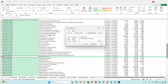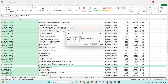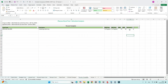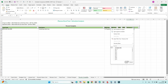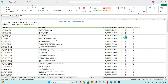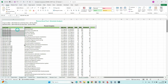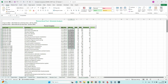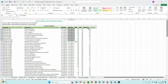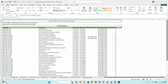With a quick search for negative values in percent complete, we find related entries in earned value as well — negative 20, negative 1000, and so on. By checking this, we can identify where the issues are. This file can also be used for a quick review with your team: give them the activity list and ask them to confirm the progress — for example, whether an activity has 70% progress, or if an in-progress activity showing 65% within the month is accurate for verification.